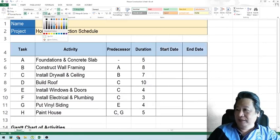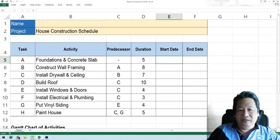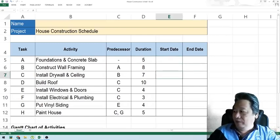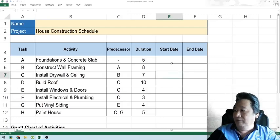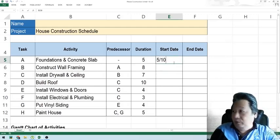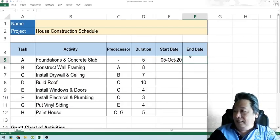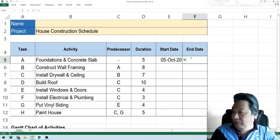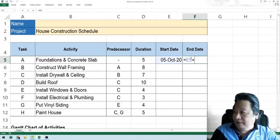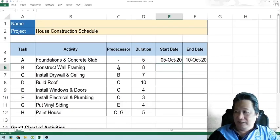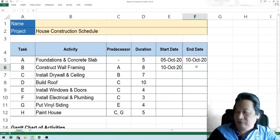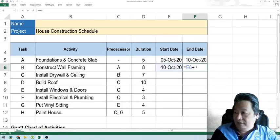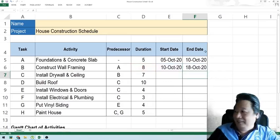For example, we're going to start on October 5, 2020. It ends after five days, so we use the formula of this date plus five days. Activity B starts after A, so we use the formula: the end date for Activity B equals this start date plus eight days.